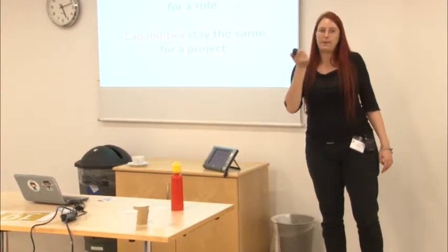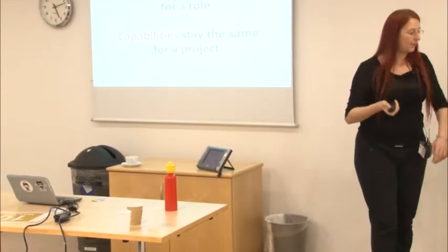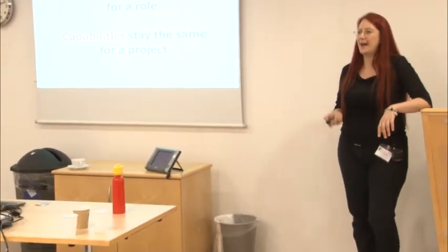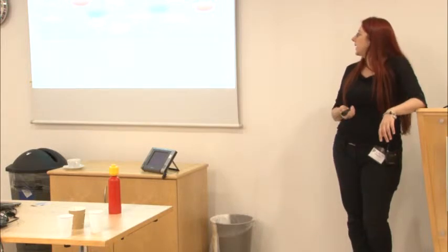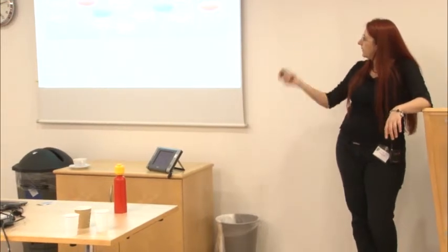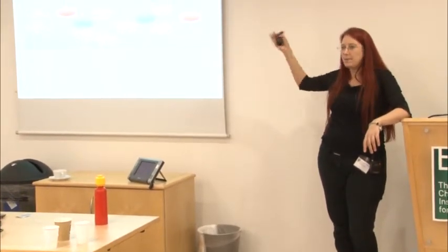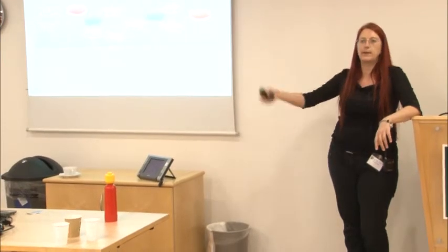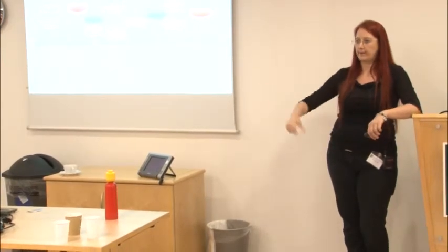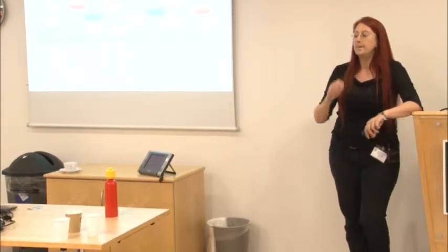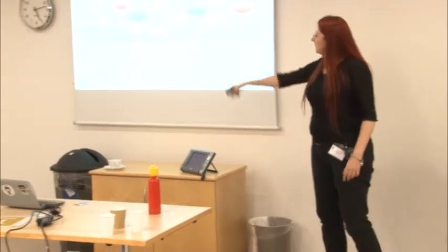Goals stay the same for a role. Capabilities stay the same for a project. It is enough to plan just with the capabilities. We have done this. We did this on a big energy trader. So whenever I talked to them about the project, they would always draw the three main architectural components, and we then put the capabilities that each of those components would deliver. The capability to book this type of trade, the capability to generate this kind of risk report, the capability to calculate this particular risk. That was what it was.